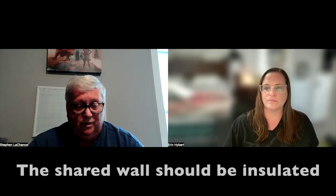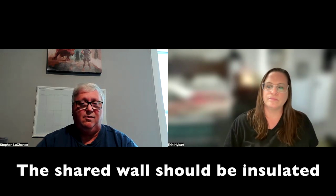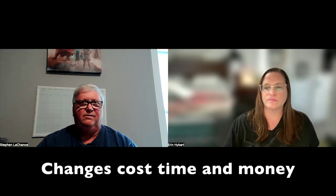I don't think so. I mean, we did hit a couple of snags. One of them was that we found out as the project was going along that the walls were not insulated. So they had to tear all of the drywall off, insulate the walls, and then re-drywall. He charged me several thousand dollars for that extra work, which I didn't have a problem with. It did add about another week or two to the project.